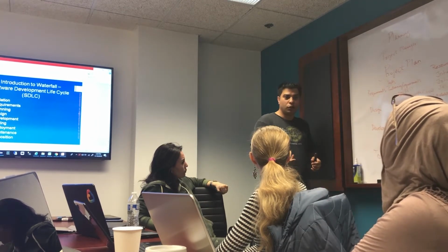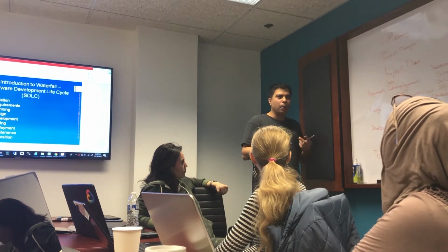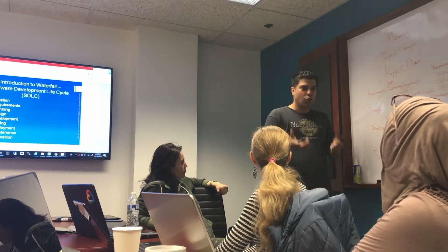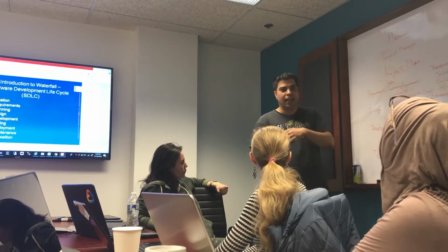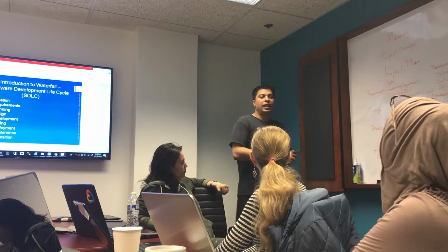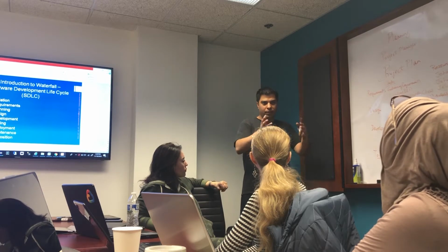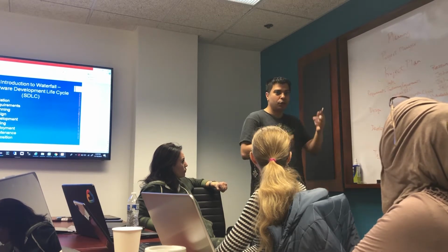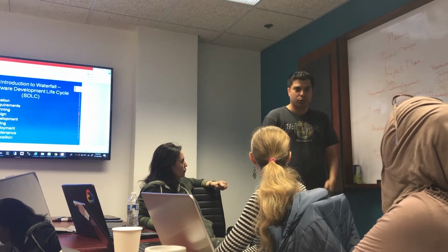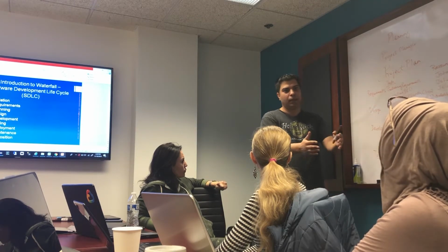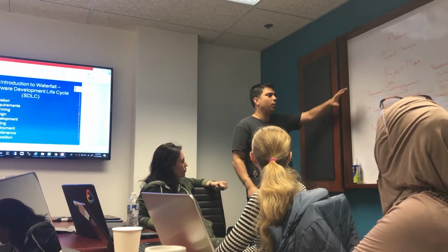Can we get more resources? Obviously it'll increase the cost, which is fine. Usually with companies like Bank of America, money is not the criteria that much, it is the timeline, that we need to finish something in time so that the company can benefit. So then they get more resources and then they reduce the timeline. That's why a project manager needs to negotiate. If this is how much time it's going to take, then we need to bring more resources and then reduce the time. There's a lot that goes on with the project manager, but this is how a project plan looks like.